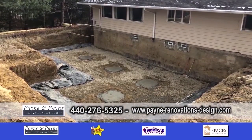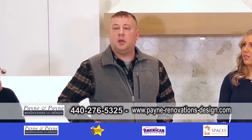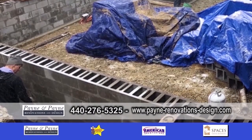So when you extended this, you actually made a basement as well. During wintertime construction, we had to figure out ways to blanket the soil to keep it from freezing. Also heating once the concrete was poured to remain within spec.